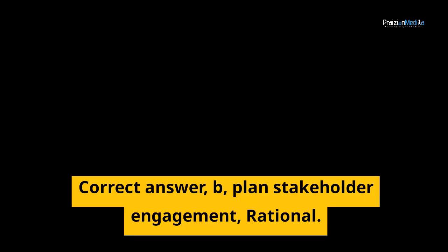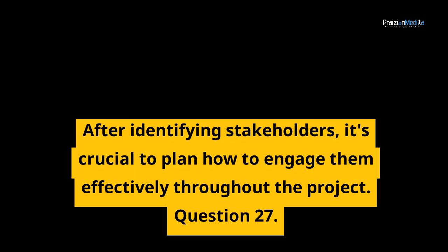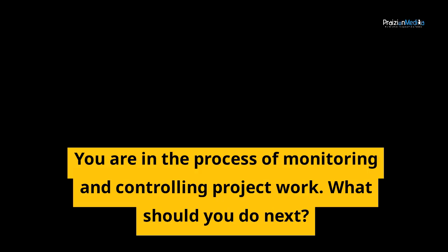Correct answer, B. Plan stakeholder engagement. Rationale. After identifying stakeholders, it's crucial to plan how to engage them effectively throughout the project. Question 27. You are in the process of monitoring and controlling project work. What should you do next?